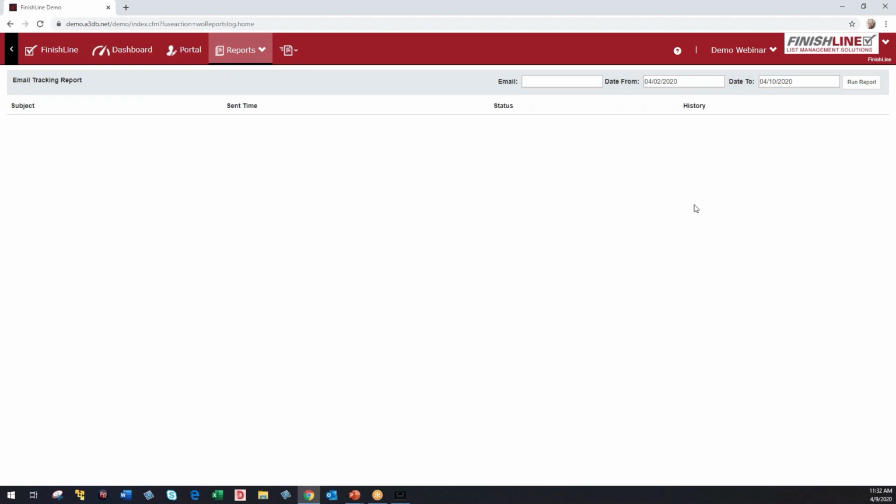So if a sub tells you that this item wasn't on their report 3 months ago, you can always go in here to the email tracking of the reports and say, hey, yeah, you received this 3 months ago, you opened it, and it was on your report. Here's a copy of it. And tell them they have no excuses for not getting it done.